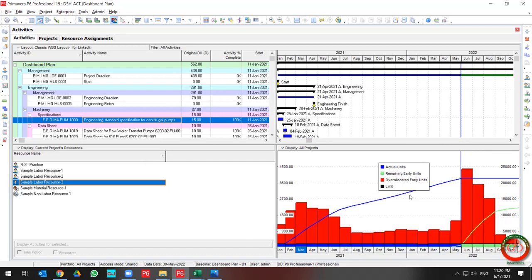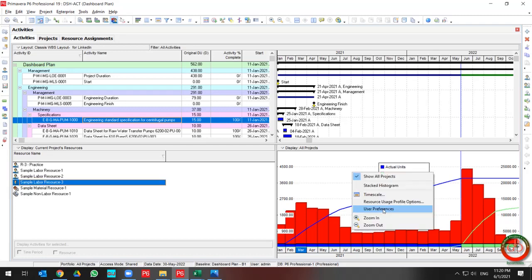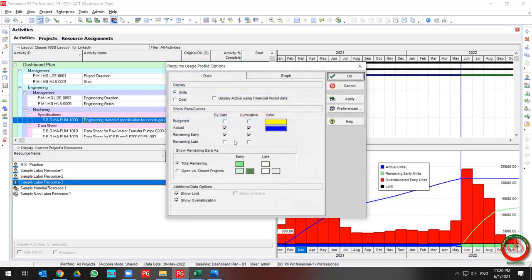The blue curve shows the Actual Unit in cumulative, the green curve shows the Remaining Early Unit, the red curve shows the Overall Allocation Early Unit, and the black curve shows the resource limit.